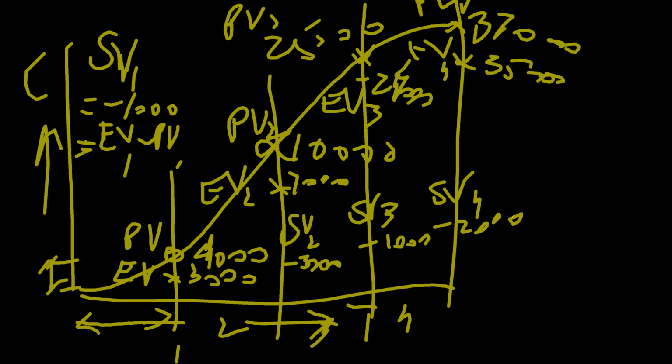Yes, apparently, but actually you don't really know, because you don't know the total budget for each project. What if the budget for the other project is in millions, and for that project 10,000 is just nothing? Therefore, schedule variance is not a very good indicator. The only indication this is giving me is whether I am behind or ahead of schedule.